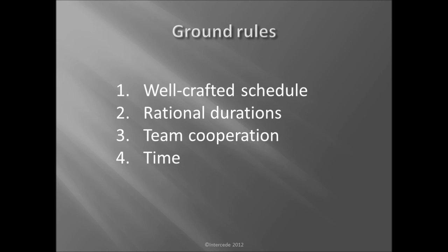The most important of which is that the schedule that we're going to use is well crafted. It has passed both the P6 schedule log and the Primavera schedule check. And that means that basically it only has two open ends. It has no hard constraints, and it has no negative float. And further, that it basically captures all of the time variable activities in the project.